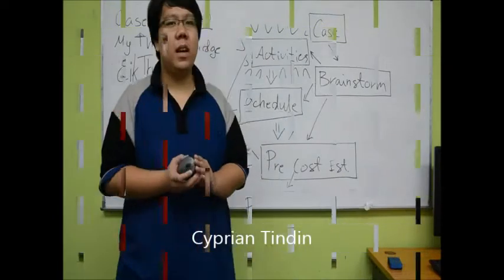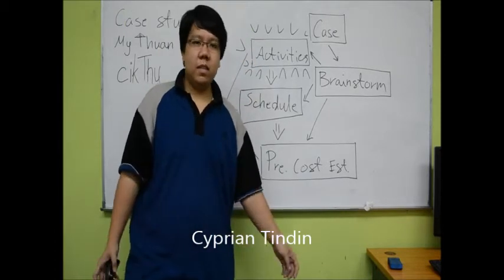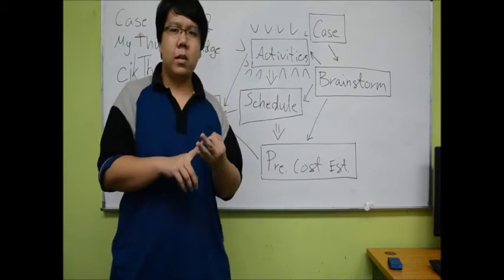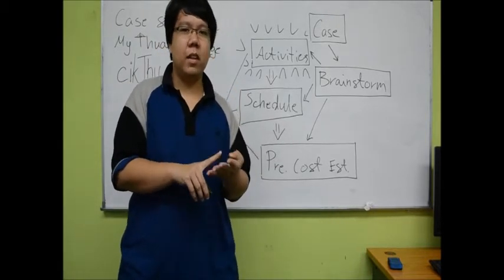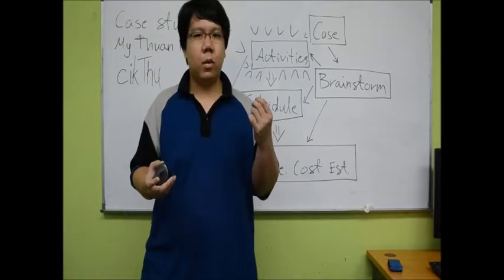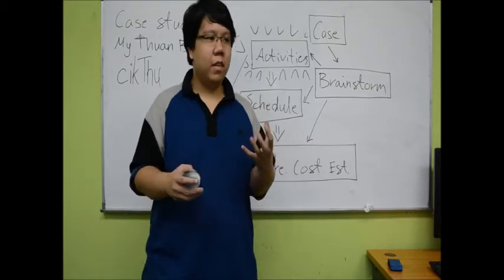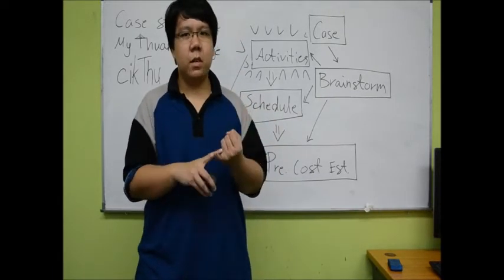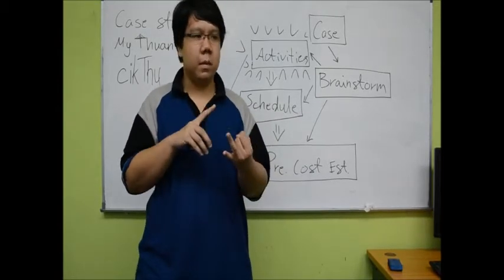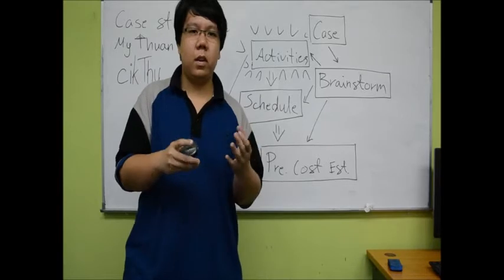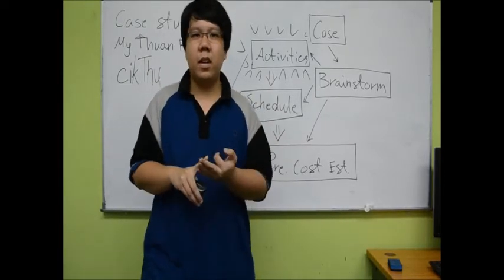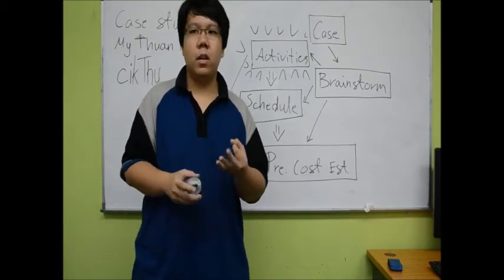Hi, my name is Cyprian and I will be talking about activities. Under activities, there are 4 phases, namely the pre-feasibility phase, the feasibility phase, the creation of the construction contract, and finally the construction and commissioning of the bridge itself. Under the pre-feasibility phase, quite a lot of time is spent. This is, we believe, for the soil investigation, since it can be very time consuming. The next is the map study to determine the closest point on both lands so as to create a cost-effective bridge, and finally to create an order of magnitude.